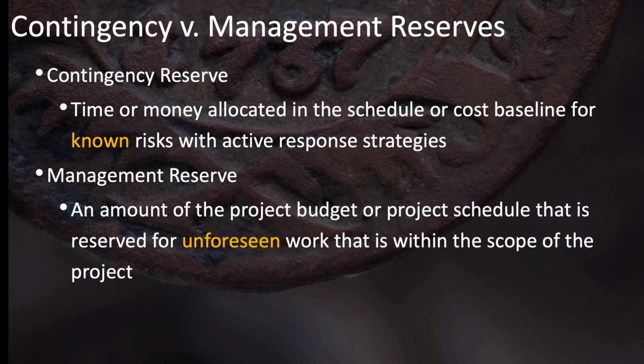The management reserve, on the other hand, is for other things that have not been identified as risks, things that could go wrong that you haven't even thought of yet. But it does have to be within the scope of the project. So management reserves will not cover or should not be used to cover increases in scope.